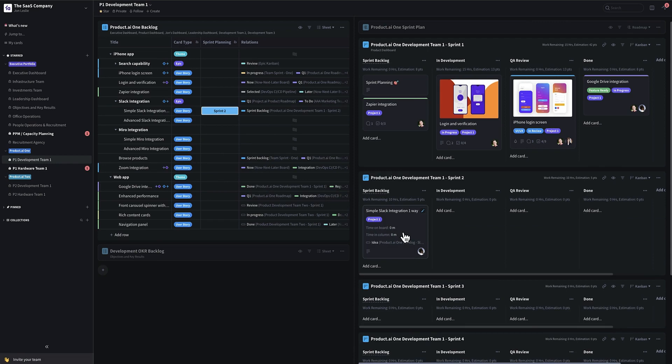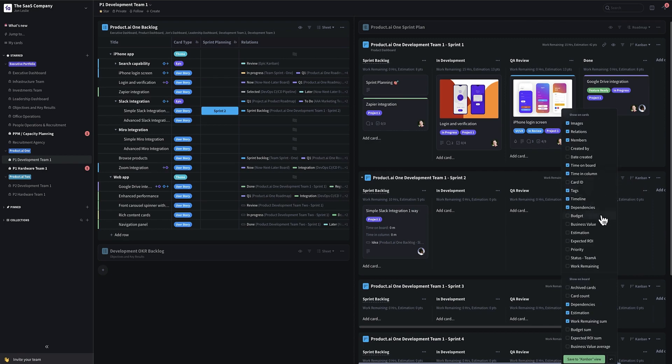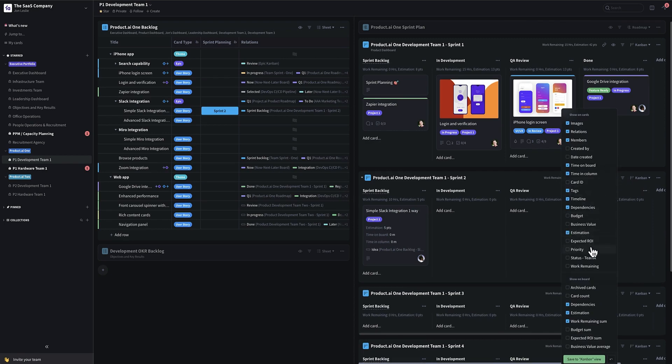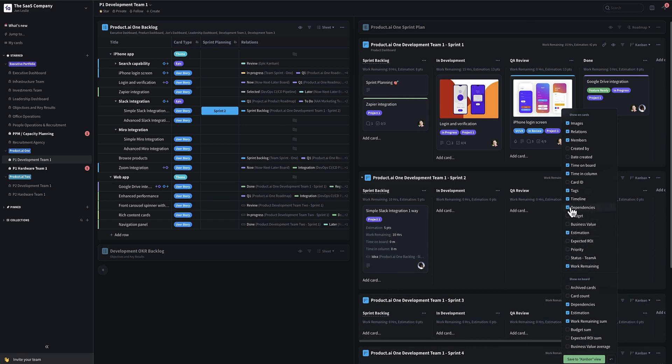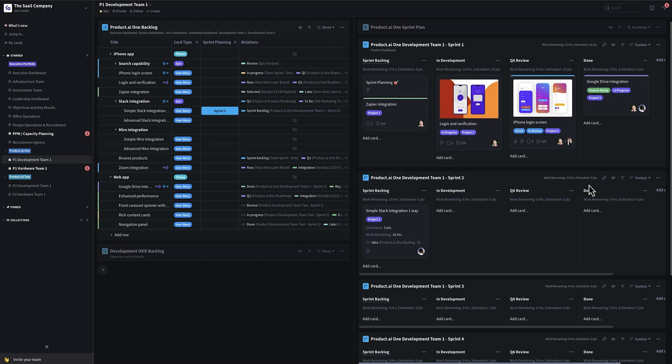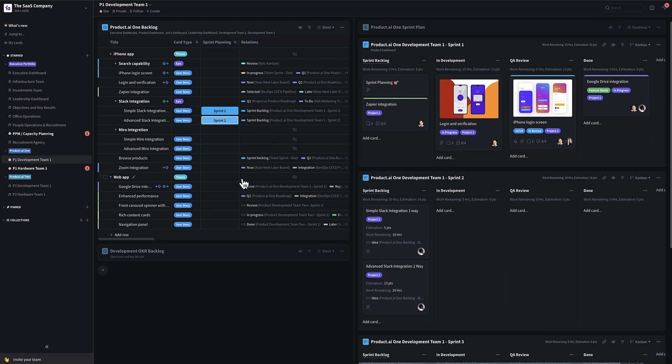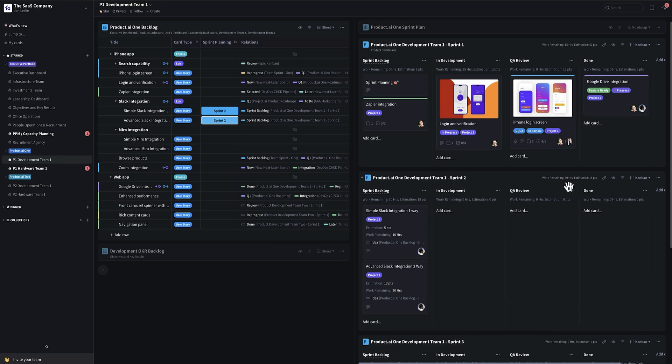It automatically adds it through an automation to the sprint backlog like this along with its corresponding estimation, and maybe work remaining, if we broke things down in advance. And you can see that's rolling up to the total on the board. If I add another one to sprint two, look ahead, automatically adds that backlog item to the sprint backlog for sprint two, and you can see that work remaining total and the overall points estimate starting to roll up.